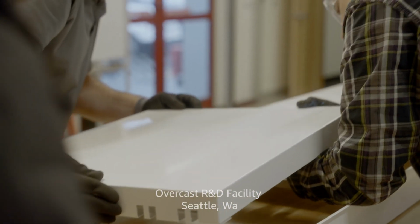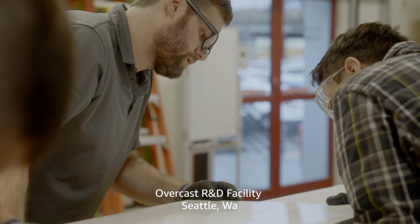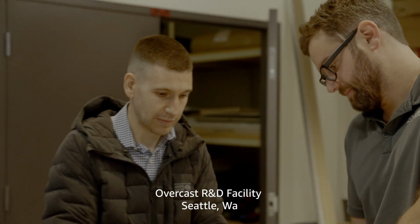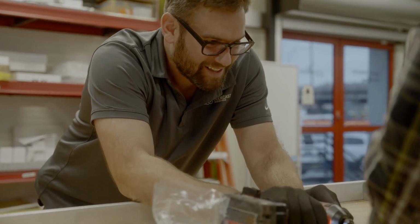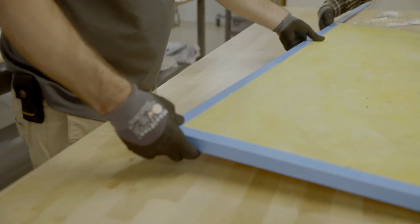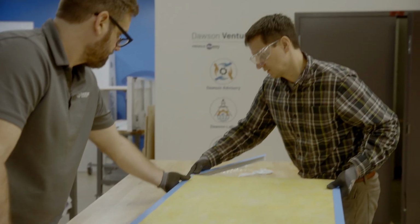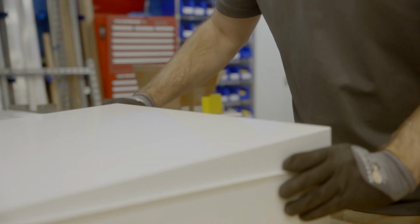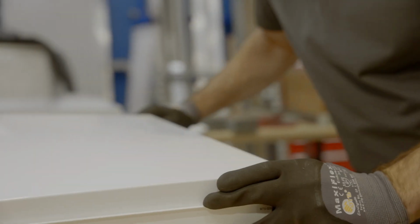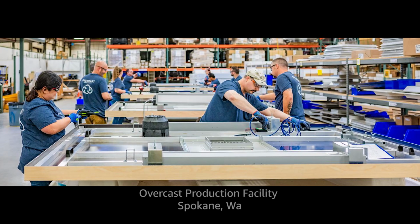Once we start publishing design documents, James Rooney, an applied engineer, comes on board to where he can start understanding the current project that we're working on. I am James Rooney. Around 90 to 100% CD, I'll jump in. I'll finalize the cloud locations. I'll finalize all the different finishes that go along with that. Make sure everyone's on the same page of what's going where. And then bring in our actual procurement to get these products produced and delivered in a timely manner for on-time delivery.